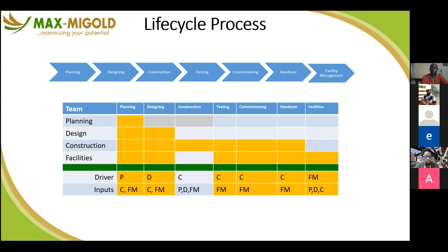At this stage too, the FM is also supporting the process of documentation. A building may be complete, but it's only 50% if you don't have proper documentation that describes, explains what has been built. So the FM at this stage is very, very careful to ensure that there's proper documentation, especially as-built drawings and as-built bill of quantities. Because things will be changing and construction is going on, those things need to be updated in those documents, the drawing and the bill of quantities.